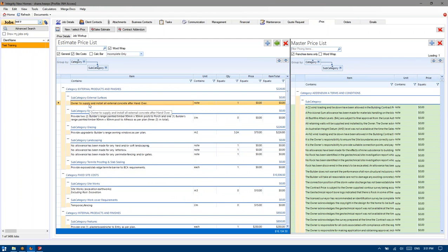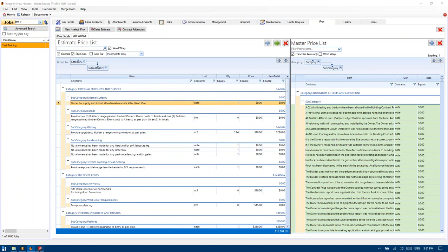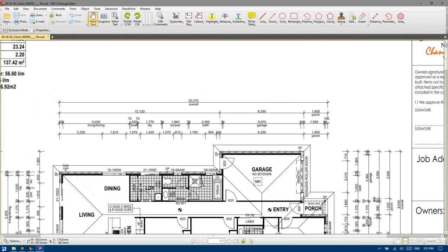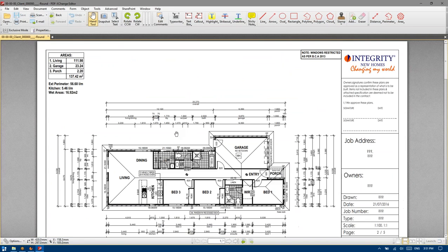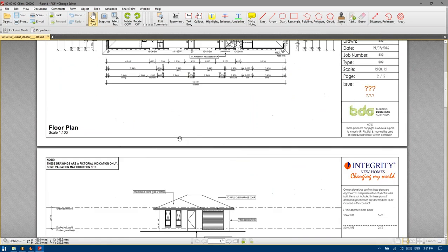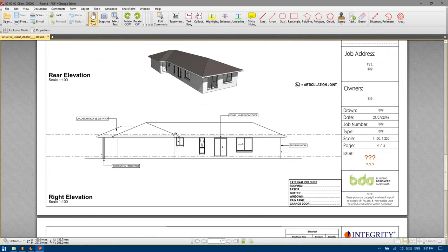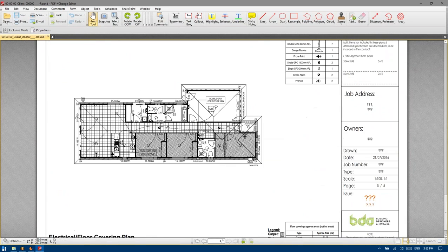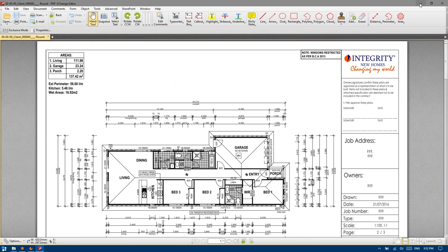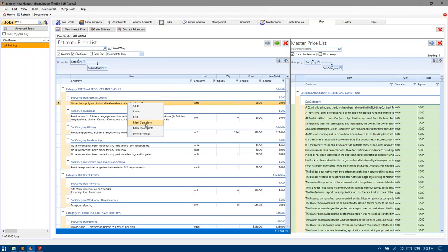So I've got owner to supply and install all external concrete after handover. Now since I don't have a site plan and I've got absolutely no knowledge of requirement to supply concrete or an area around that, then that's a worthwhile note reinforcing. So we just go mark complete.